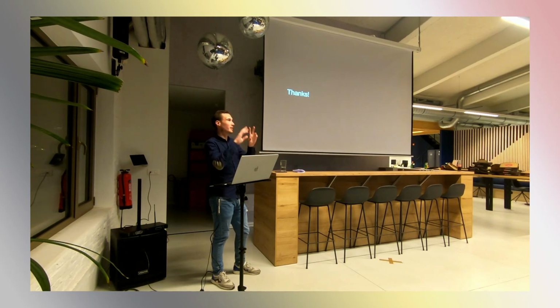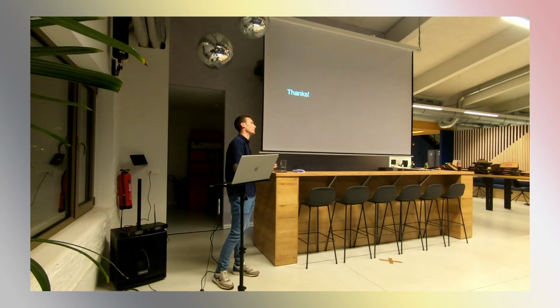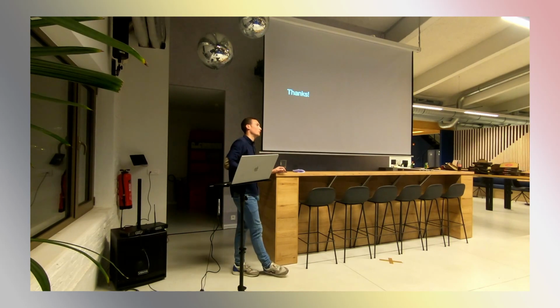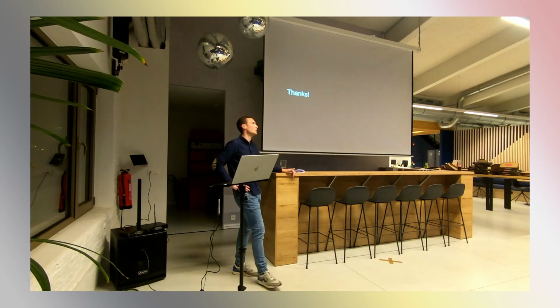So we have a global velocity per technology, but we also have a specific velocity per team, which makes it easier per project to see where we are going to end up. So a different velocity per team, but also per project. Yeah, but the general line is more or less the same. The average is more or less the same. I think it changes by about 0.5 story points a day.